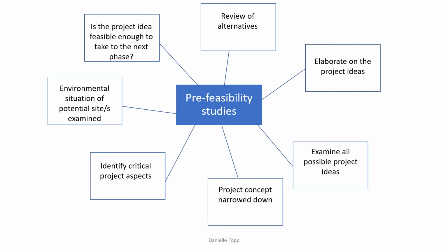Now, during a pre-feasibility study phase, the project idea must be elaborated on to obtain more detailed information. However, the formulation of a full feasibility study that enables a definite decision to be made on the project is a costly and time-consuming task. Therefore, before a company assigns larger sums and time for the feasibility study, a further assessment of the available project ideas must be made during the pre-feasibility study.